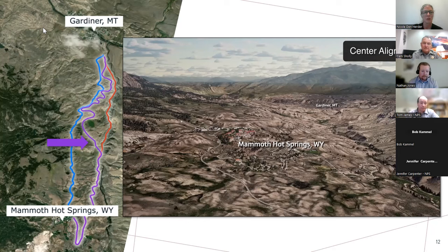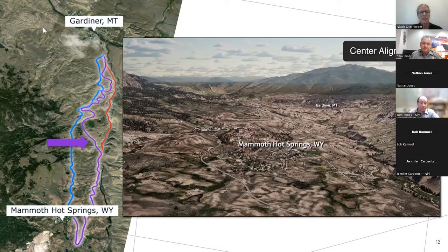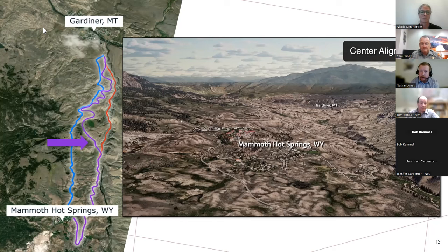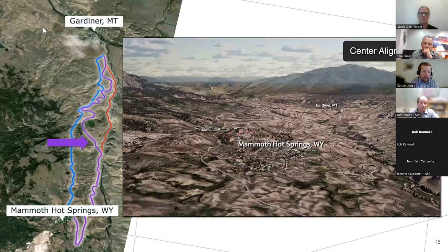Nicole: And we do have one more question — will the footbridge near Rescue Creek and the Gardner River be replaced? It's at the base of Mount Everest. Nate: The Rescue Creek bridge got wiped out during the same flood event. It's in the process of design right now — we're going through an exercise identifying the type, size, and location for the replacement bridge. It'll be for both pedestrian and stock use in our current design. We're working with Federal Highway, the park service trail crew, and some backcountry law enforcement on what that bridge needs to accommodate. The next step will be to initiate a separate compliance process from the roadway project, and it's on the front burner for construction. Cam: No matter what alternative is selected, we will put that bridge back in. The bridge replacement is also on a much faster timeline than the construction of any of the three road alternatives.